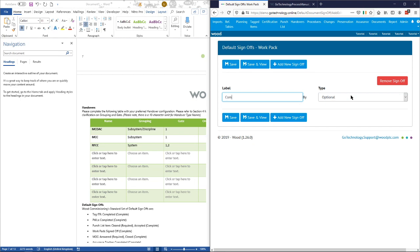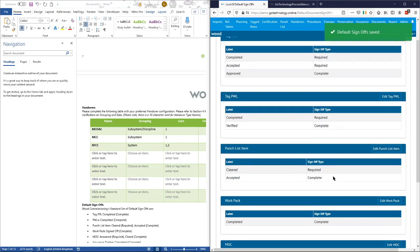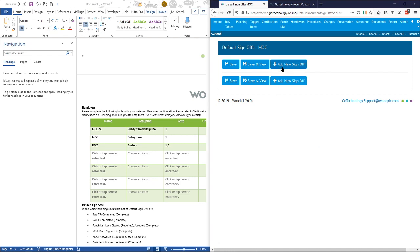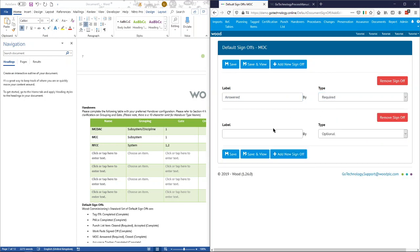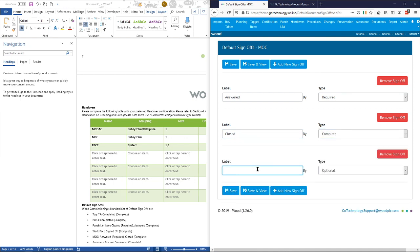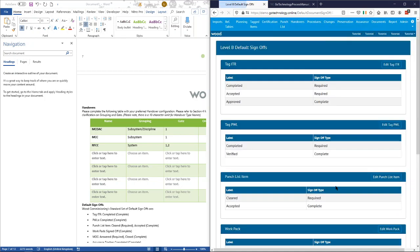For work pack we'll just go with completed PI and a single sign-off of that. For MOC what we'll have is: answered by — required — and then closed by — complete. We might also want an optional field for something like audit by, in case there's a random audit of MOCs. You can have an optional field before or after any field. You can't have a required field after complete because complete is the final one. So we can put that in as optional — save and view.